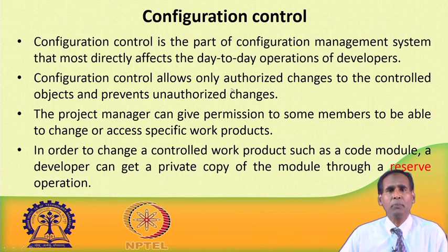So, that is why configuration control allows only the authorized changes to be controlled and it prevents the unauthorized changes. The project manager can give authorization to some specific members who will be able to change or access the specific work products, and others cannot make any unauthorized change or any unauthorized access.